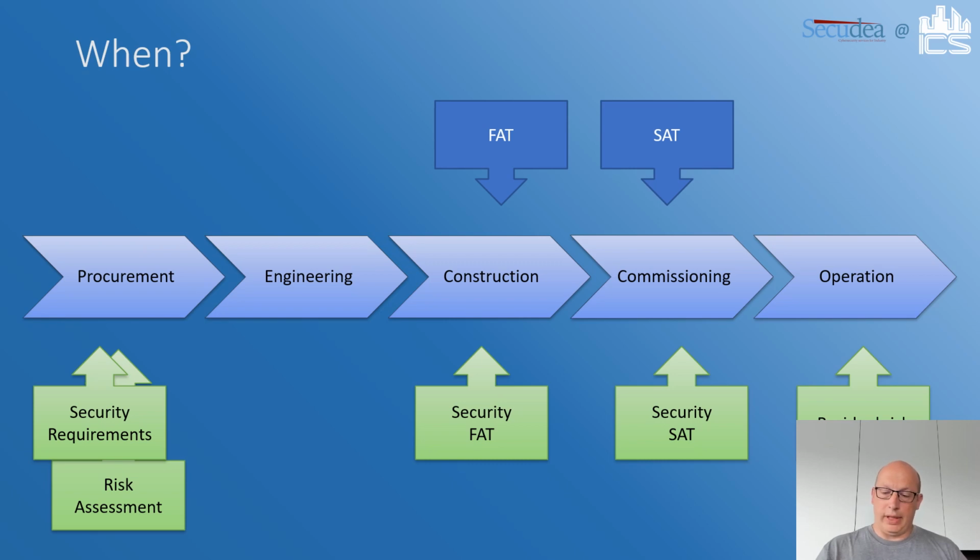It is sometimes very interesting to do functional testing and cybersecurity testing during FAT or SAT at the same time, because then operators, INC people, even the vendor will see how the system reacts on the cybersecurity testing events during a real scenario.